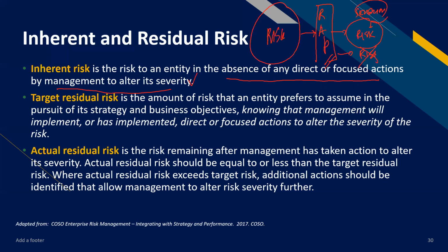Right? That severity after the implementation of the risk action plan is called the target residual risk. Okay? So that is the severity knowing that management will implement or has implemented the risk action plan.